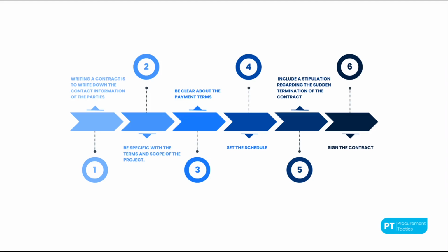So to protect yourself, include a clause in the contract stating that any payments you've received are non-refundable in the event of project termination, regardless of the reason. This is especially important if you plan to invoice throughout the project duration. By having this clause, you can safeguard against investing a lot of time and effort, only to have the client bail out and refuse to compensate you for your work.